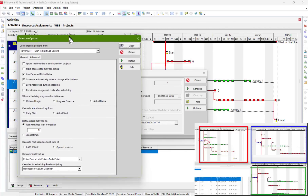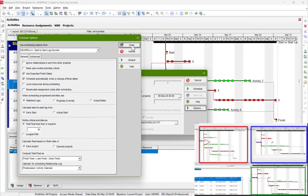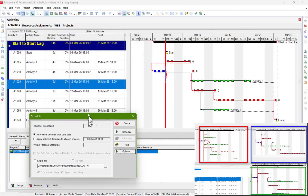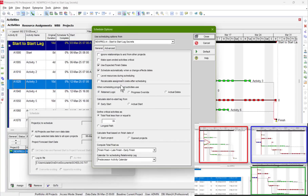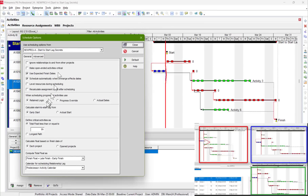If you don't know about this, go to the Options. We have an option called Retain Logic. When you choose 'Early Start' for the calculated start-to-start lag — 'lag from start' — with Retain Logic, it will assume that activity 1 and activity 3 have a finish-to-start relationship even if they don't actually have one.